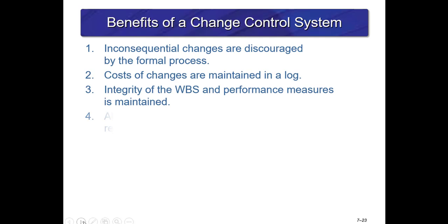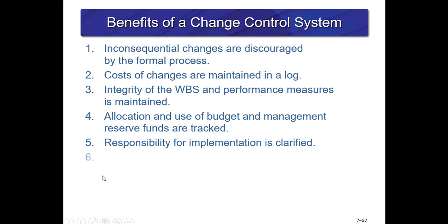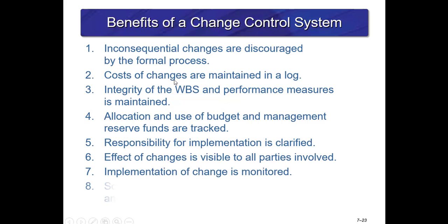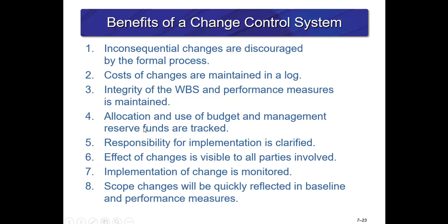Some benefits of a change control system: being able to maintain the cost of changes. It maintains the integrity of the work breakdown structure, helps the project manager allocate and use the budget and management reserve funds and track that, and the implementation of changes is monitored.